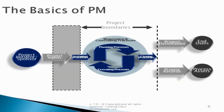When you look at PMI's basic process framework, it creates a very simple organizational structure that almost every major methodology for executing projects complies with. It starts with a project initiator who has an idea, or a sponsor who wants to begin a project. That initiator or sponsor says this looks like something that should be managed as a project, and so those inputs begin the first step, referred to as the initiating process group. Once the project is formally approved, you move on to the next step: the planning process group.